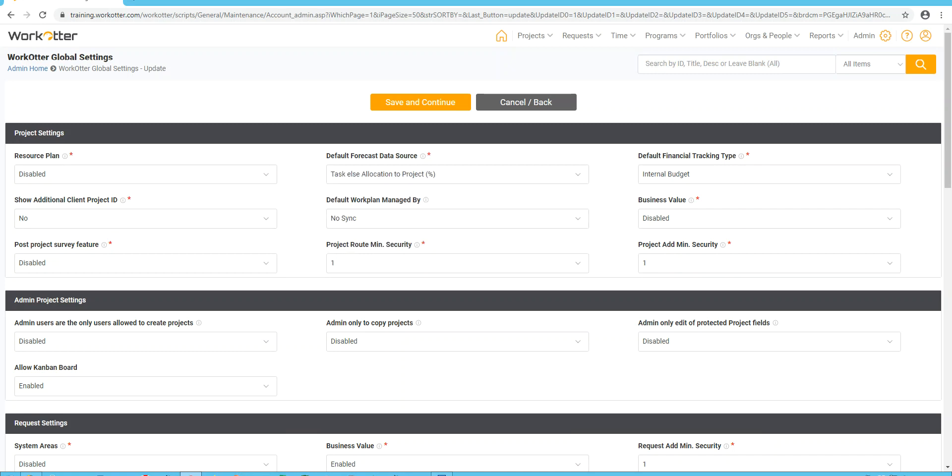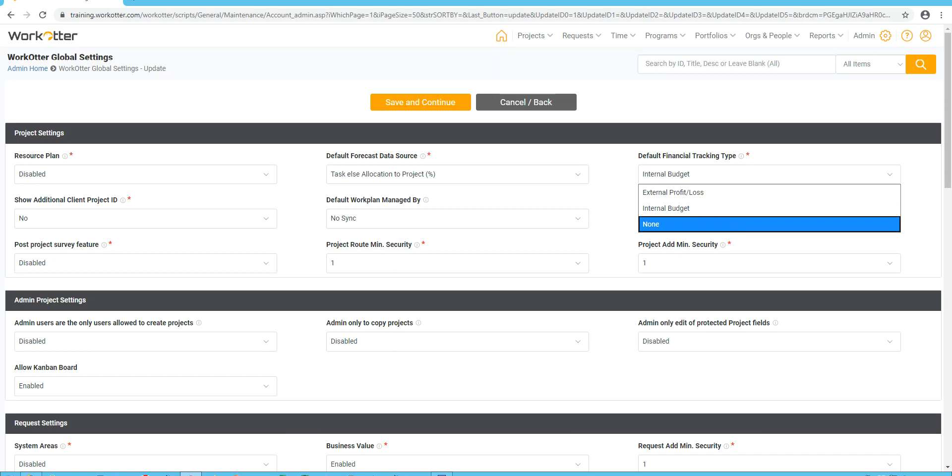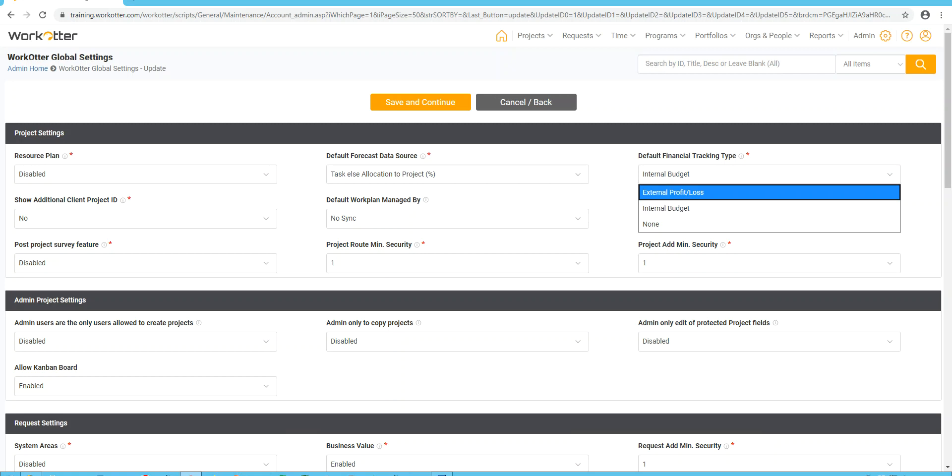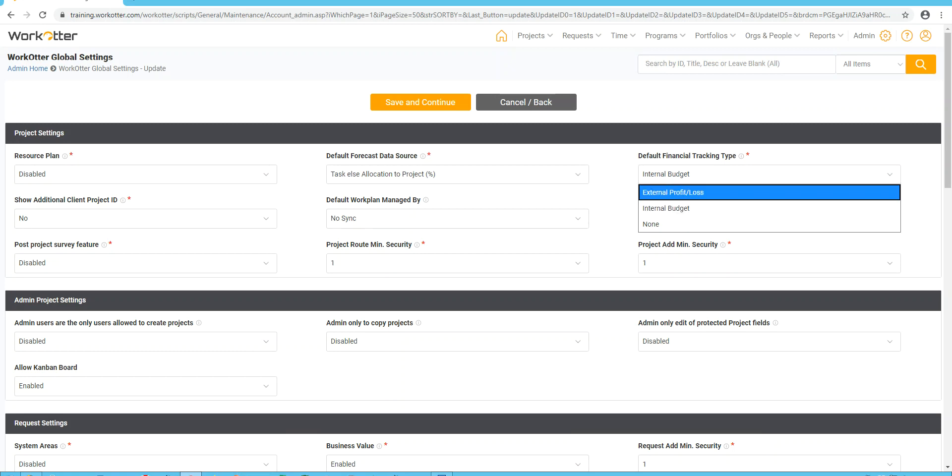As far as the default financial tracking type, this should be pretty obvious to you. If you're not tracking financials, please set it to none. If you are tracking financials but you don't actually perform projects for your external customers, leave it on internal budget. If you track a combination of projects, both internal and external, where you want to calculate the profit or loss for those external projects, and those are predominantly what you do, then make the default external profit and loss.